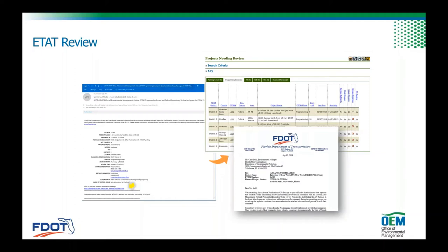And for all of those agreements that we have with all those ETAD agencies and partners, there are performance measures tied to that we give them every quarter. How did they perform? We asked you to do X many things. Did you do X many things on time? And we rate them with percentages. If they happen to be late or miss anything, it docks the percentages and highlights those issues as well. And it just starts that continual conversation on how we make sure folks are engaged and on track and on time.